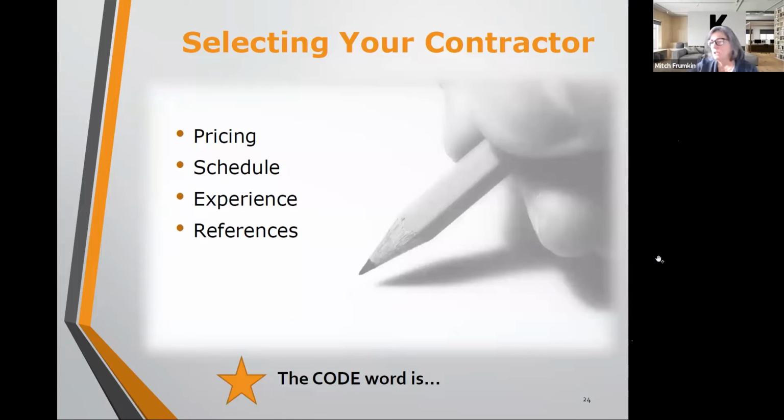So in selecting a contractor, it's always tempting to just go with the lowest bid on the bid sheet, but there are several factors that we always highly recommend that you consider. One important one is the contractor's schedule. Can he not get to it till the fall? We always ask what the duration of the project will be. If every contractor says they can do it in a week, but the low bid says it'll take him 2 months, that may be a deal killer.